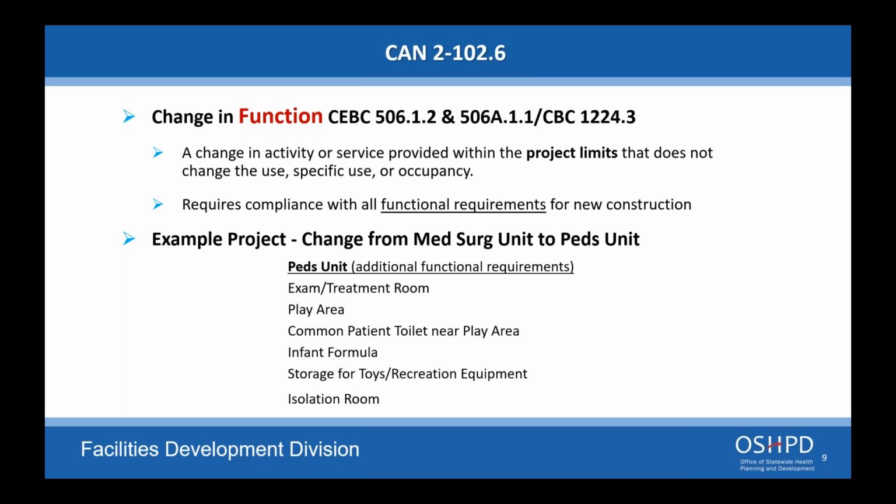Okay, so that's why I did say, I want to clarify that for cosmetic work, a permit may not be required, but you do want to contact the compliance officer to not only let him know what you're doing so that he knows there is something happening in the facility, but also so they can check that stuff to make sure that you're putting in a product that is going to be compliant.